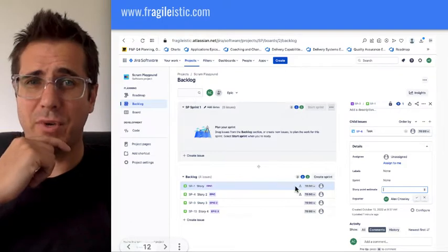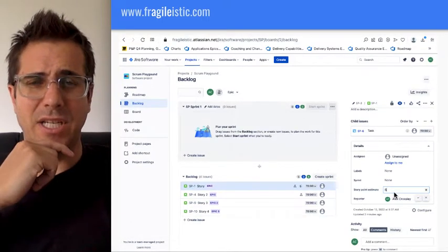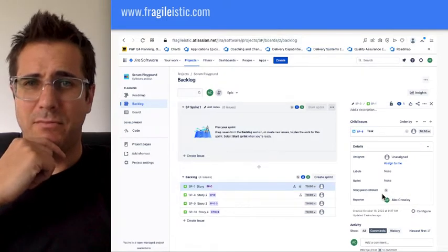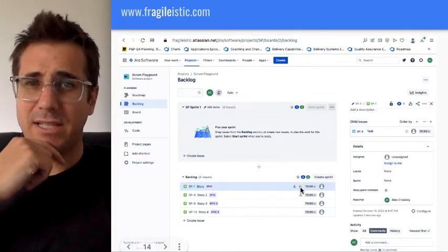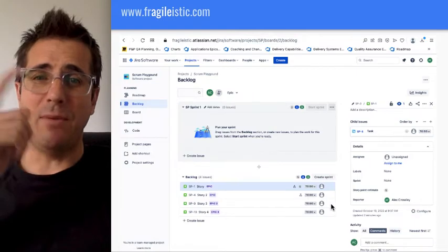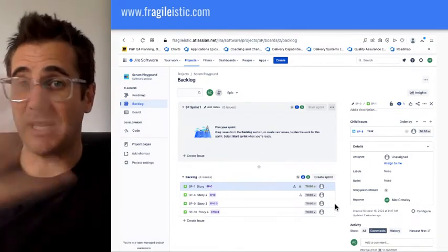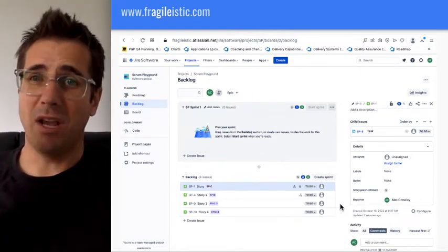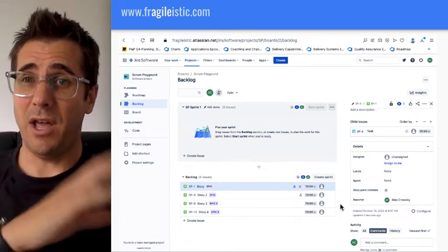Make sure we're working on the top priority. We size. We click into there, and we type in the number, and then we go, thank you very much. That's now done. We got 5. Now what happens then? It sticks a 5 there. Awesome. Then what we do is we go, well, in this team, let's say our velocity, we know it's 10. Well, we can commit that to the sprint. It's the top priority. It's 5. We know we'll get it done.